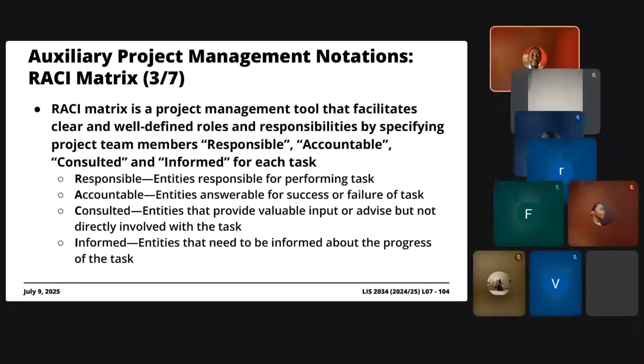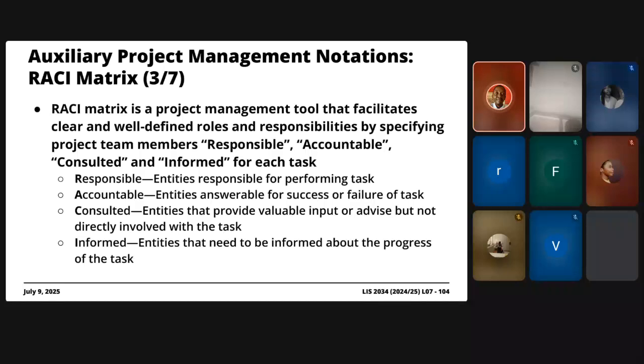And then you assign the consulted tag to an entity or a person that provides any valuable input or advice, but is not directly involved with the task itself. So I'll give you an example, right?